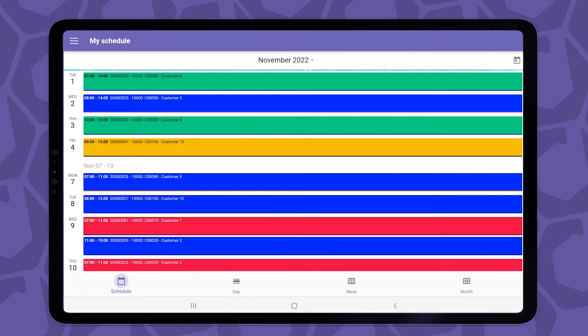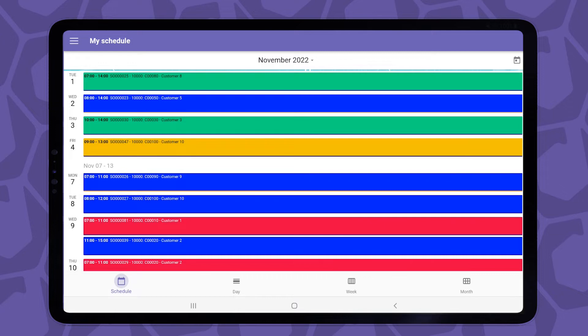When you log in, the app will look if there's a schedule for you. Now it is possible that the my schedule view won't be available to you. You see, the planner in DiEM Scheduler must link the email address of your user account to a resource in DiEM Scheduler, otherwise the app wouldn't know which resource to use to display in my schedule view. So if you want to see your schedule but you can't, contact the planner or the administrator to make sure they set your email address in the resource setup screen of the main planning application.